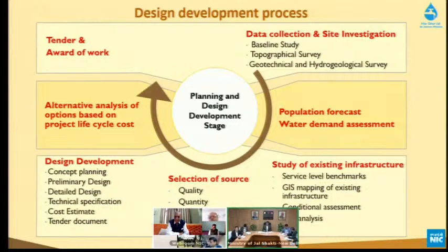Population and water demand are very important aspects, because my entire infrastructure cost, the size of the tank, the size of the pipe, all depends on our accurate population projection and the water demand. Existing infrastructure, I'll be talking about in the next slide very clearly.